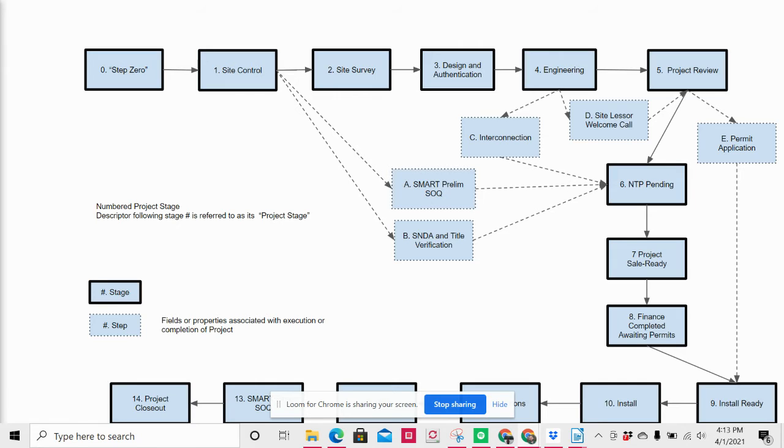So it's going to be a little bit different, but basically by taking pictures of all this stuff, even though we're not going to be really touching it, we're just trying to spot some red flags that might be an issue later down the road, in case the electrical inspector comes in and says, hey, this is all out-of-date equipment that's not going to fly. You need to bring this up to code. At least we'll have an idea of that going in rather than going in and hoping for the best. We're going to be able to verify it.